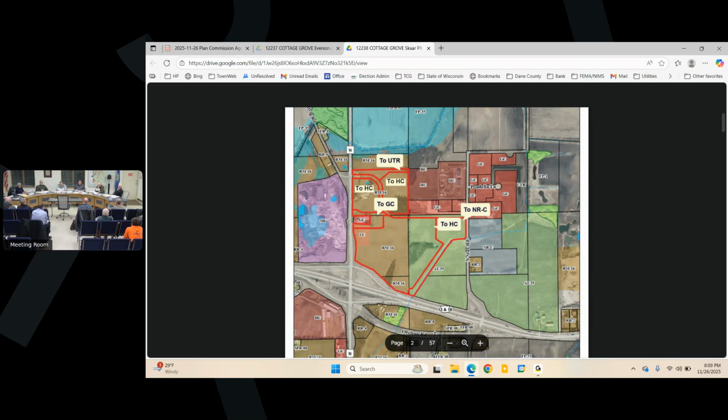My opinion is the county and state will try to push as much of that to someone else as they possibly can. Probably they'll look to the developer to prepare designs. And then the question is, you know, he raises the cost of design, cost of construction. So as you can see, there's going to be time that's going to need to be built in later to figure all that stuff out. So that's the critical path is traffic right now.